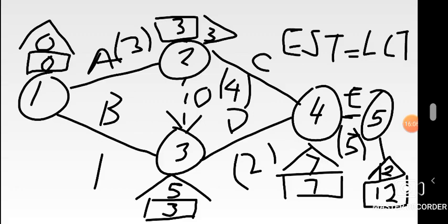All those nodes that have this criteria, earliest start time equal to latest completion time, definitely then you've gotten your critical path. So we'll begin from 1. 1 of course has that criteria already marked. Is there another node? Yes, node 2 has also latest completion time equal to earliest start time. Lastly, look at node 4. Node 4 too satisfies the criteria. It has 7 and 7.